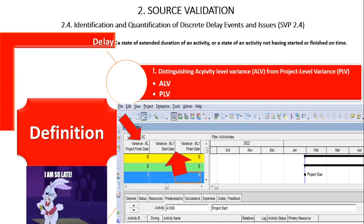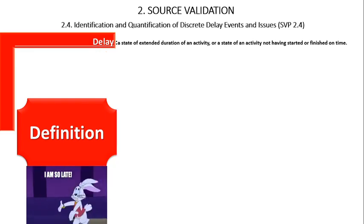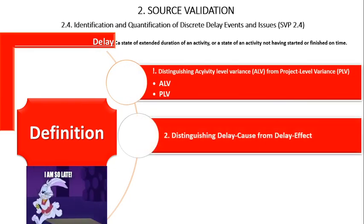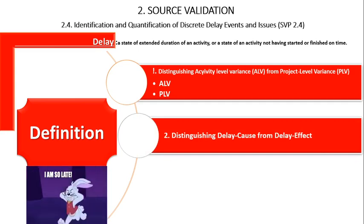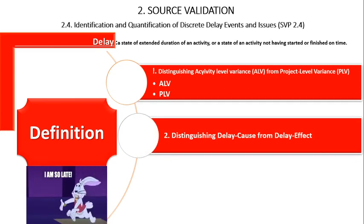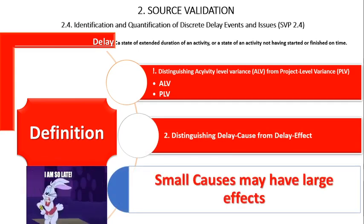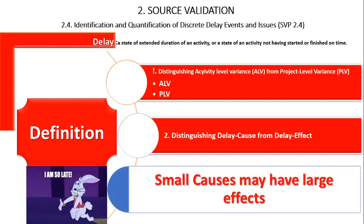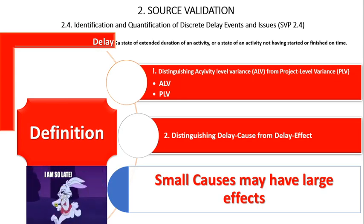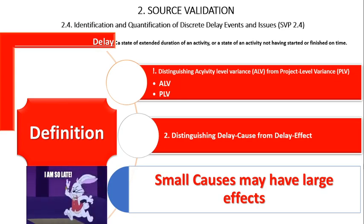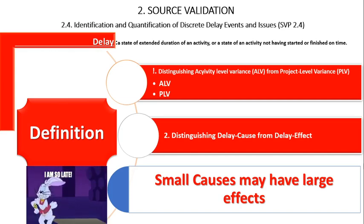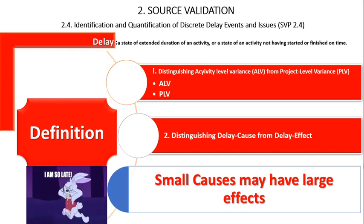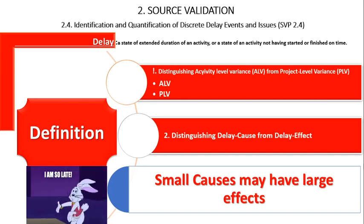The second point is distinguishing delay cause from delay effect. It is important for the analyst to be able to distinguish the cause of delay from the resulting effect. For example, a fully updated schedule may show extended activities and delayed start of activities relative to their controlling predecessors. While the cause may not be apparent, a competent statusing of the schedule will show the delay effects.